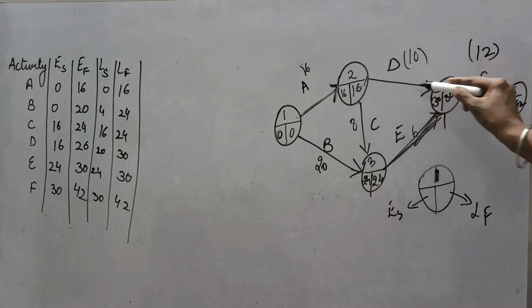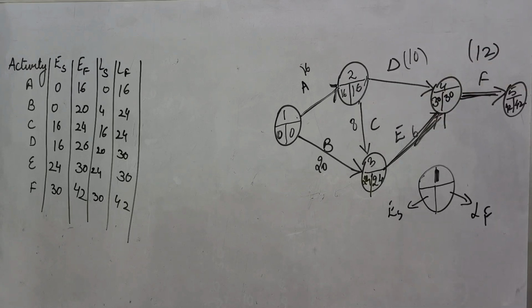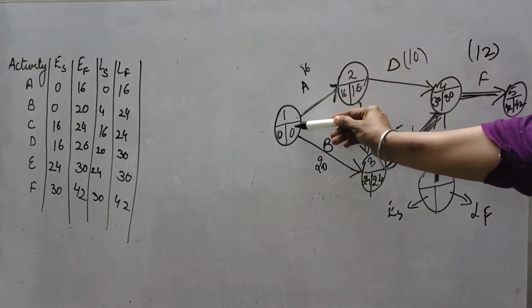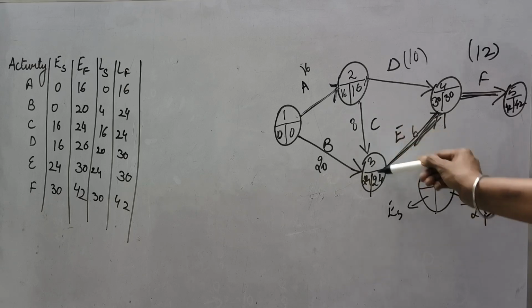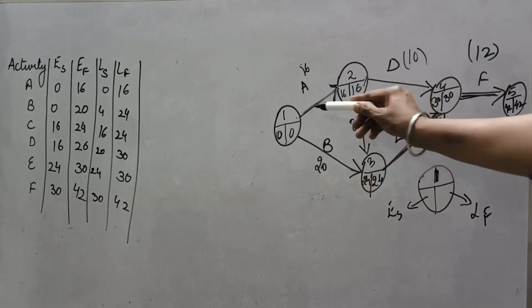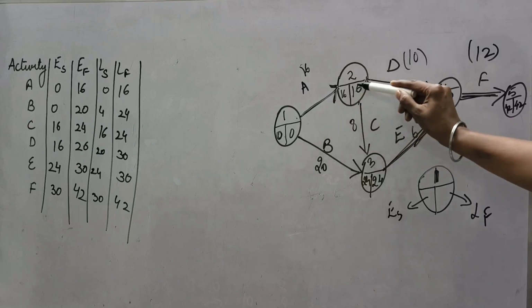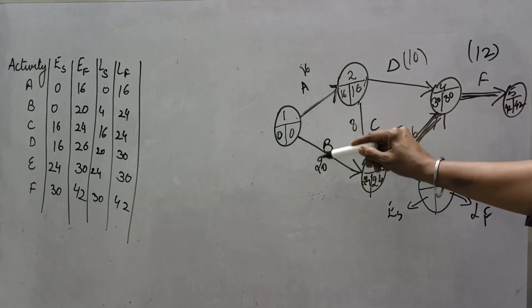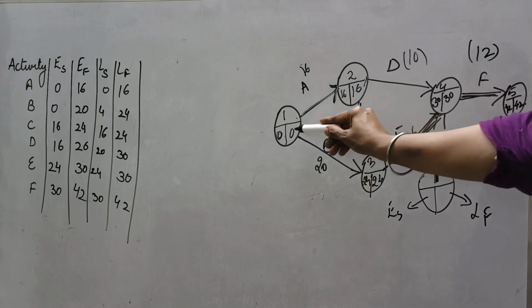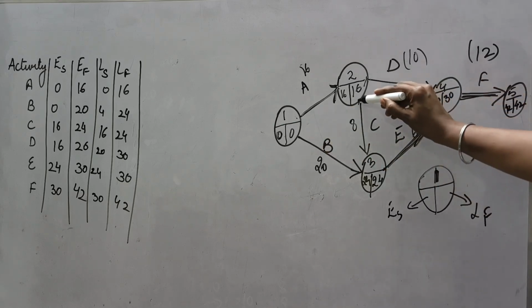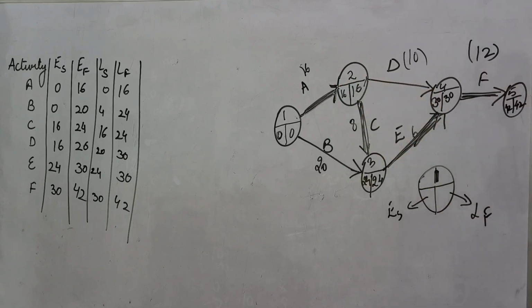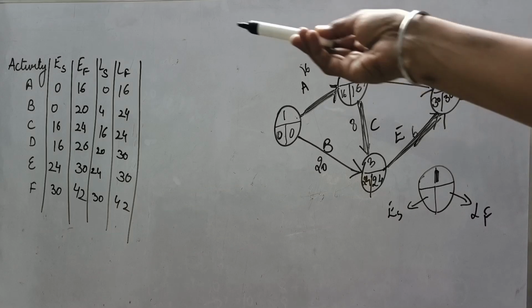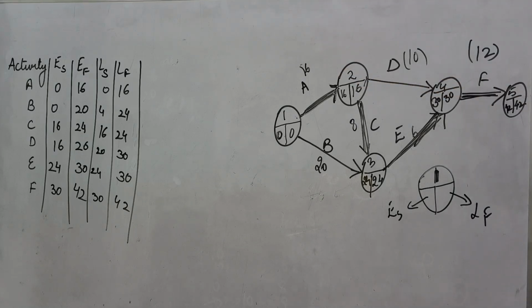So again you can see this is going to give you the same solution. And again 16 minus 16, it will be 0, 24 minus 24, because these are the two nodes. So from here, if we go back on this tail, 2 are coming. So whichever is less, that we will write. So we can see from here that this is our critical path, wherever the earliest start and earliest finish are equal, and that earliest start and earliest finish have already been shown in this table. This is how you will be writing this in the form of notes.